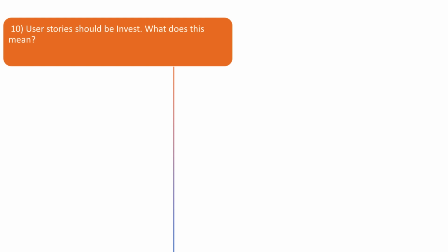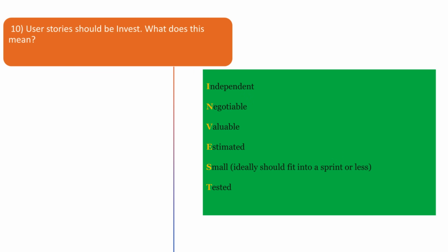It means that the story should be independent, negotiable, valuable, estimated, small, ideally should fit into a sprint or less, and tested.